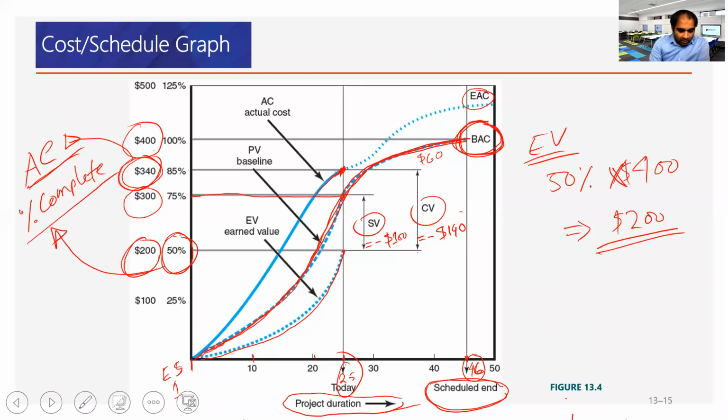We spent 340 already, but are only at 50%. So for the remaining 50%, we will need to increase the budget to 500. Again, there is planning and estimation for the remaining set of tasks. There is no specific rule that says we cannot apply a rule of thumb, as simple as that.